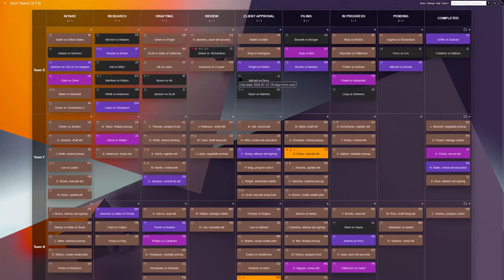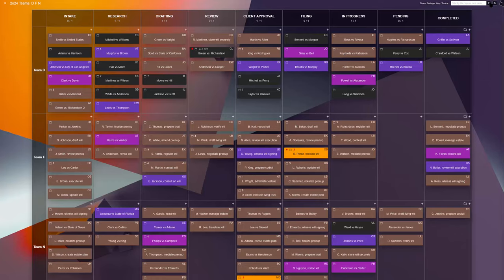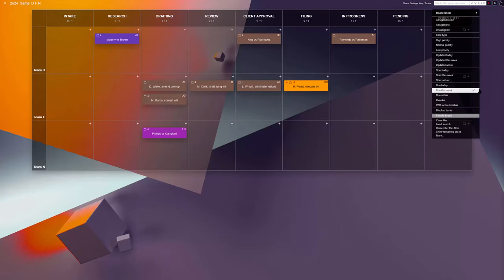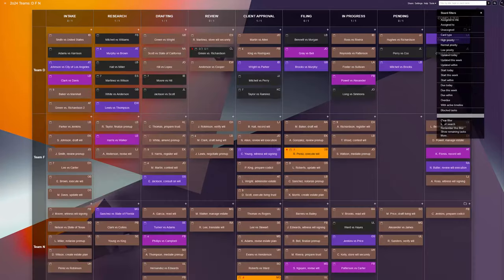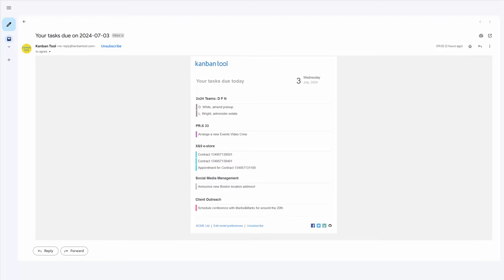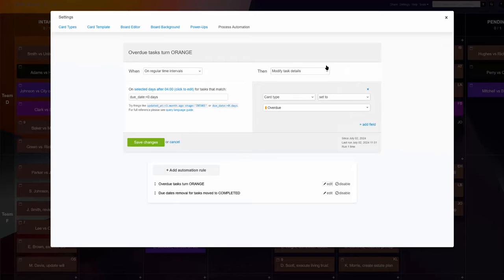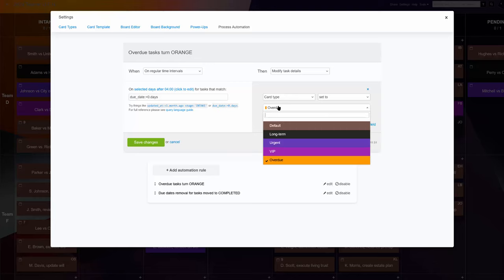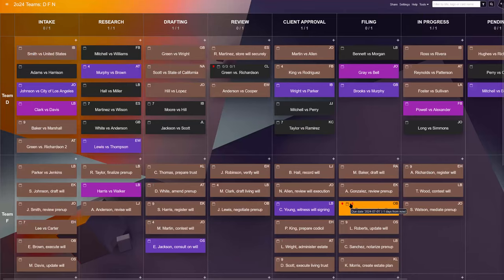This legal team relies on Kanban tool's due date reminder emails, as well as on a couple of automations to stay on track with their court appearances and all paperwork. The daily due date reminders send a message to each team member listing their assignments with a due date for today. But just to be on the safe side, one of their automations turns cards on which the due date has already passed into a bright orange color, making sure these tasks attract immediate attention at the start of the day.